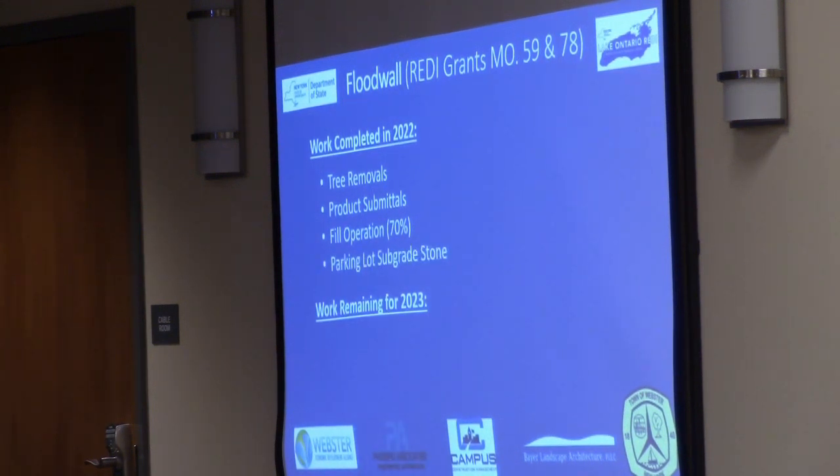The south parking lot is just stone. It's currently a staging area, but they've done all the infrastructure pieces below that and gotten up to stone at this point. And another big piece was the installation of the Pure Waters grinder pump manhole in front of the pump station. That they'll be installing a new grinder pump in at a later date.